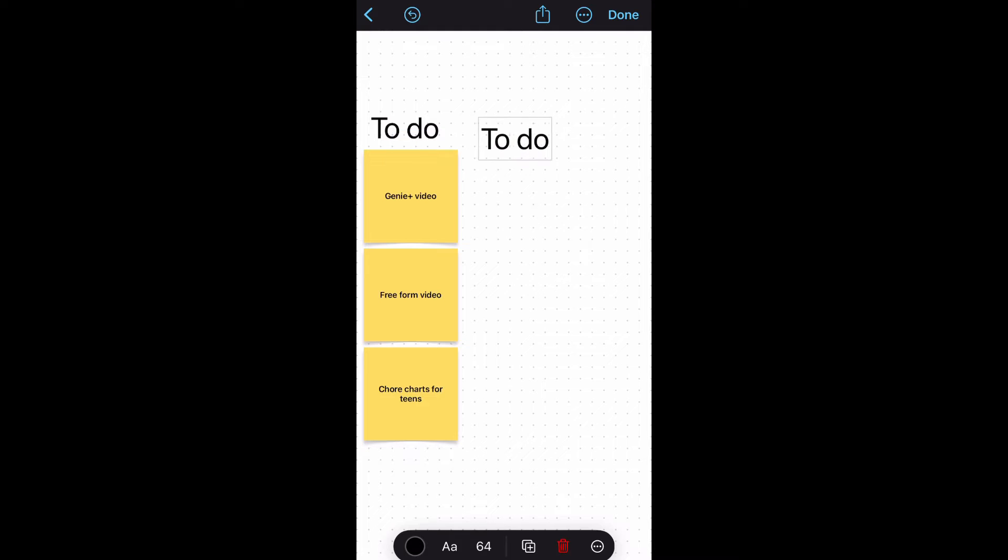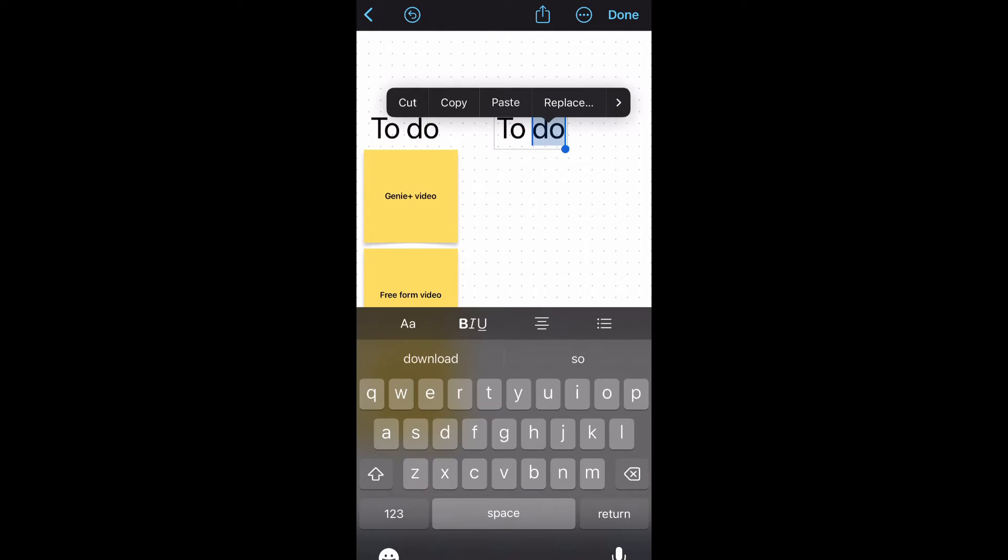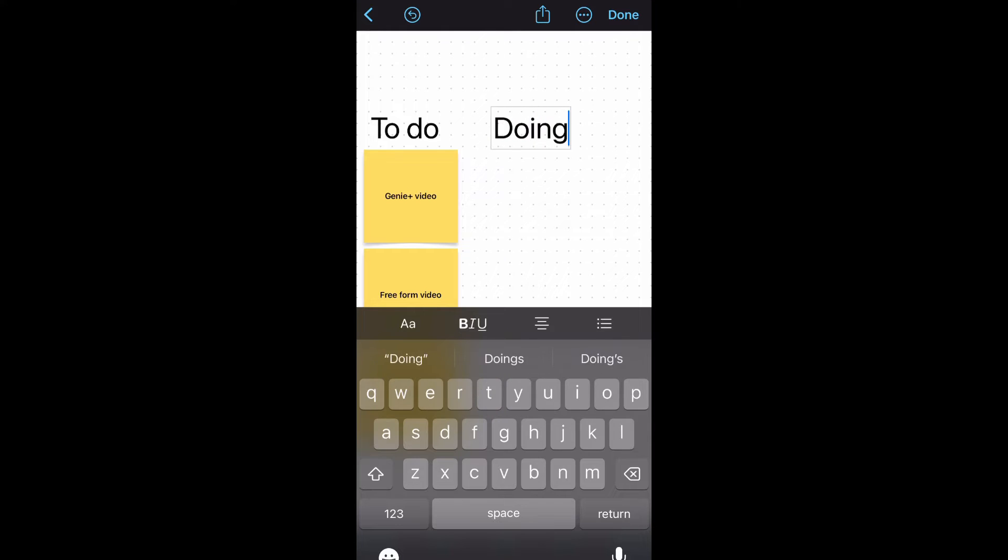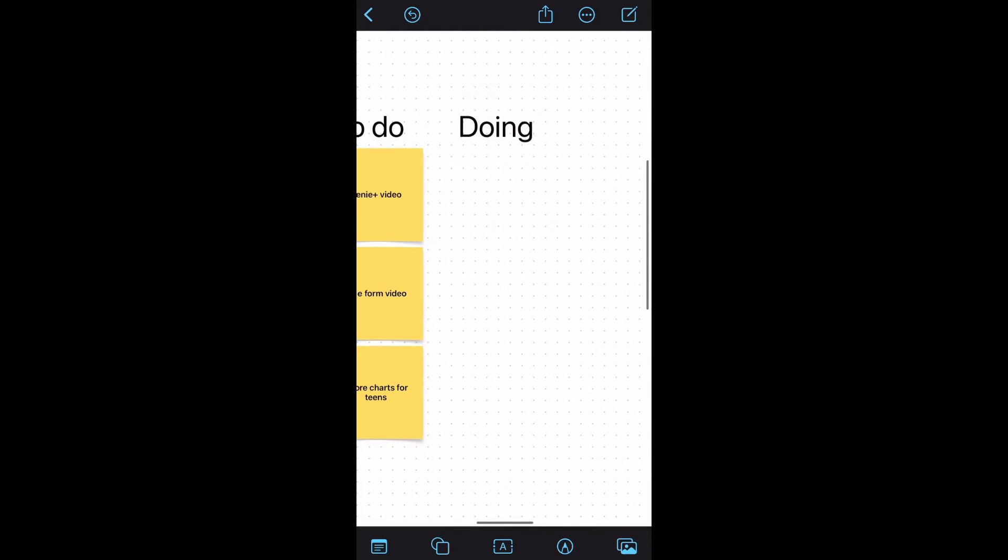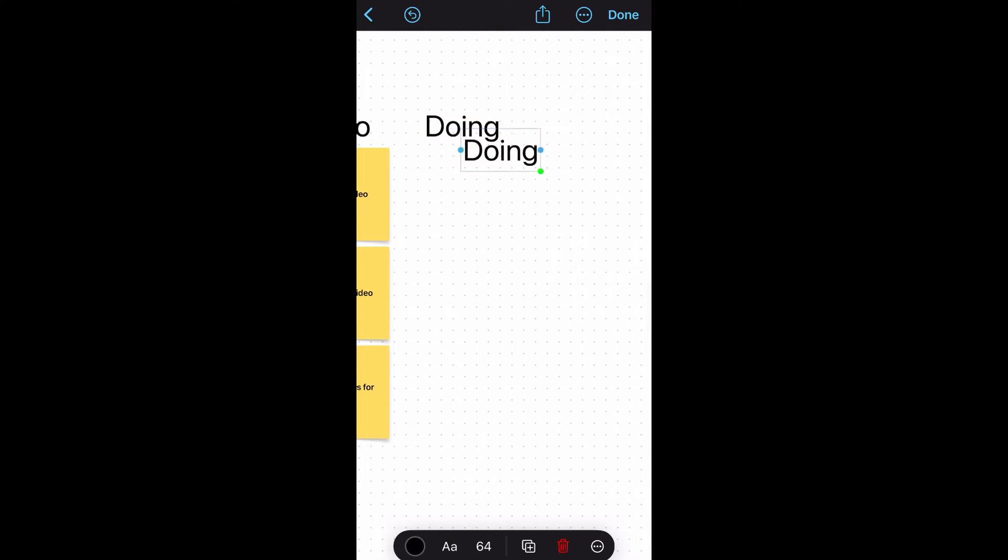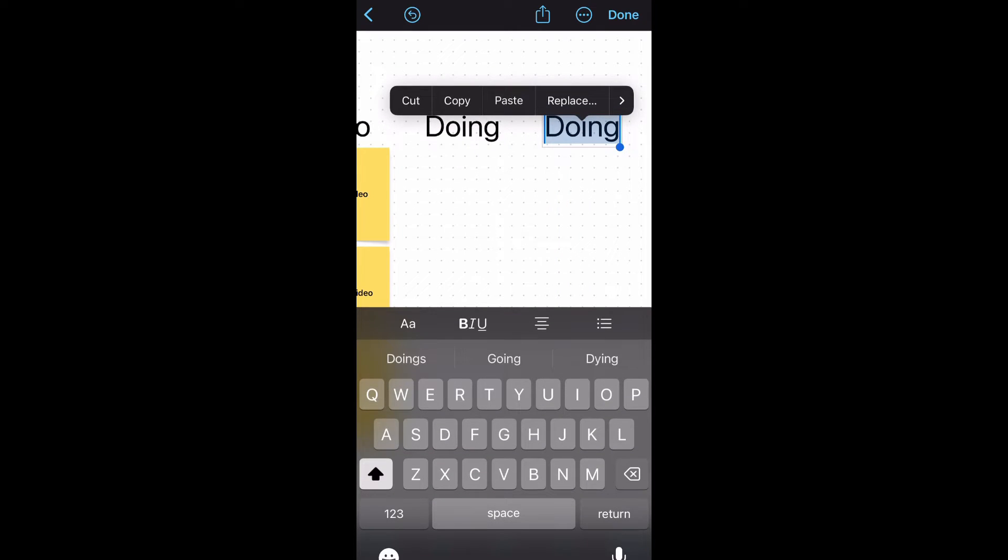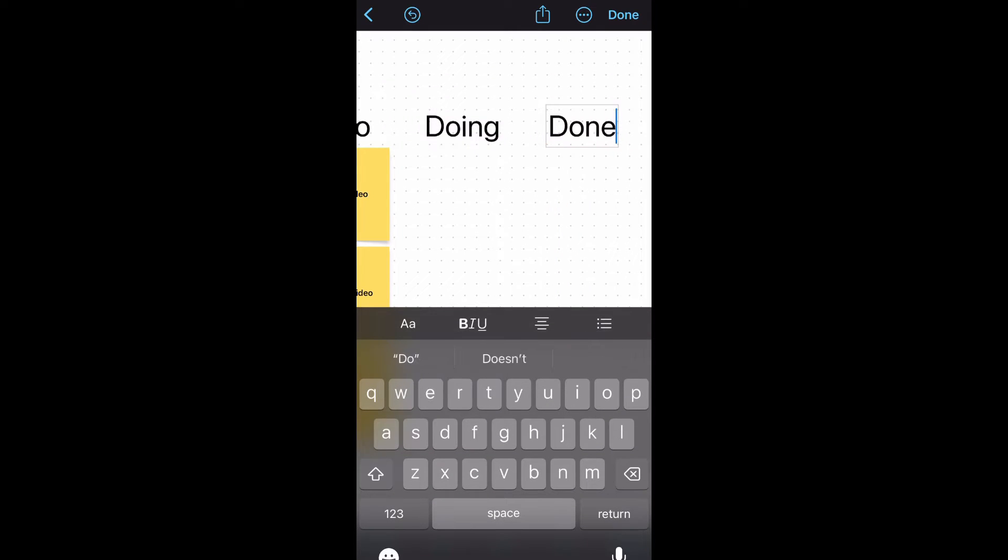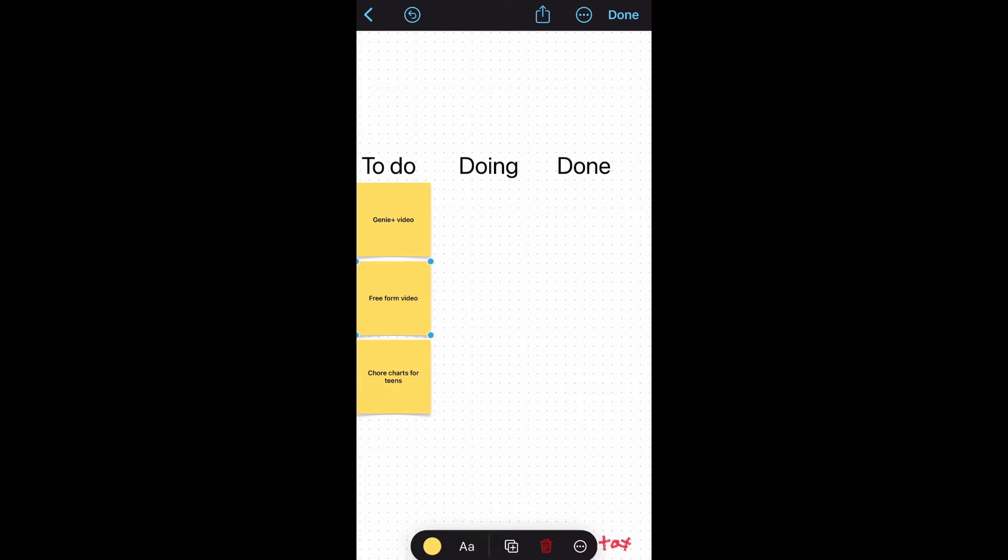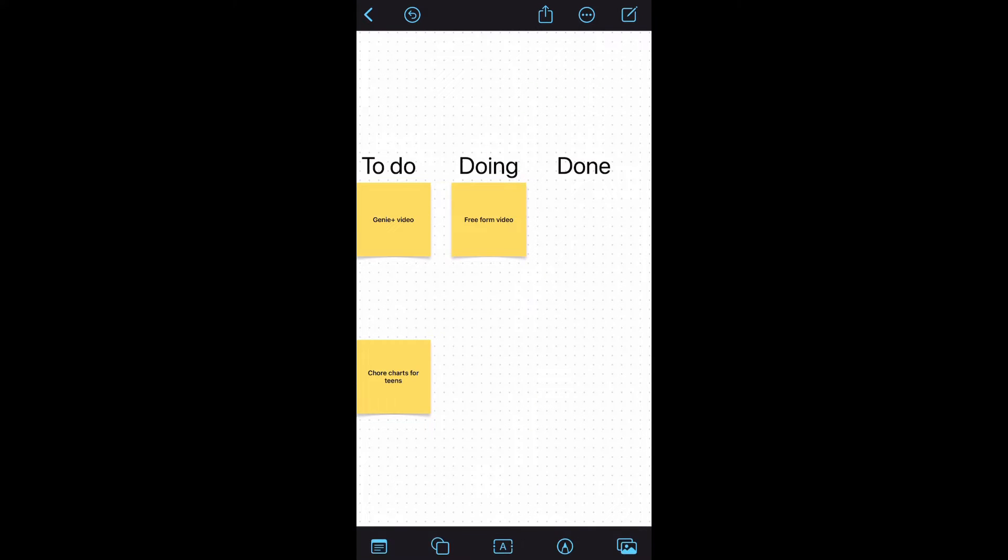So there's some cool features in this app, but how might you use them? Well, one way you could use it is by building a kanban board. A kanban board is a way to visually track tasks or projects. The idea is that you have three columns: to do, doing, and done. You add one task onto each sticky note. As you're working on specific tasks you move it over to the doing column, and when you're completed with the task you move it over to done.